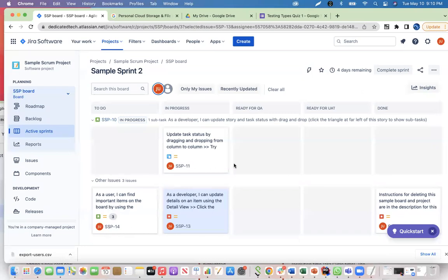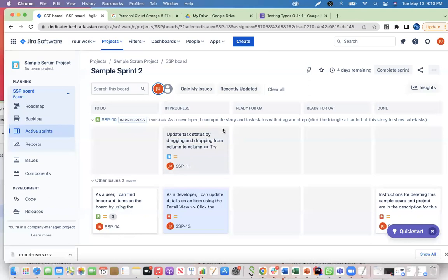Maria, you're next. So your daily stand-up, you want to answer 3 questions. Remember that, right? What you did yesterday, what you're doing today. So make believe that you did something yesterday and today, and if there's any obstacle. So we're kind of playing a stand-up meeting.